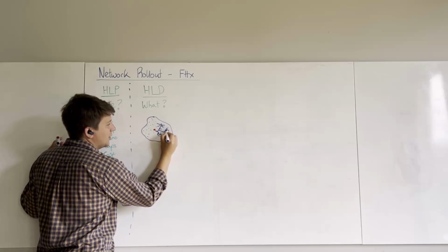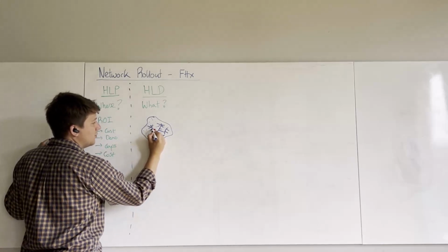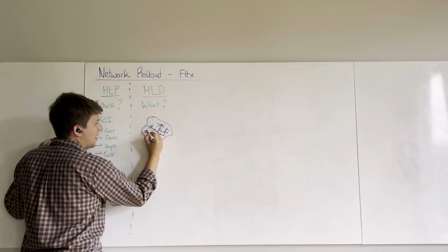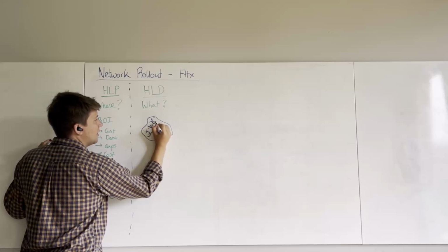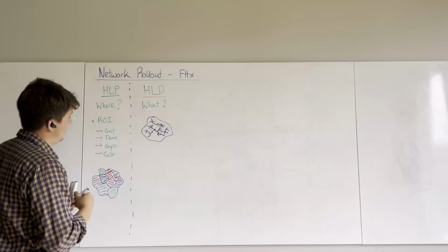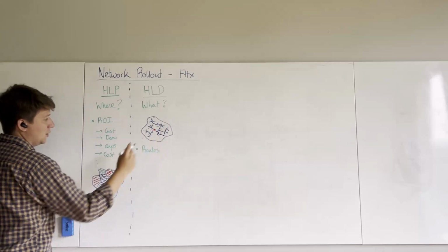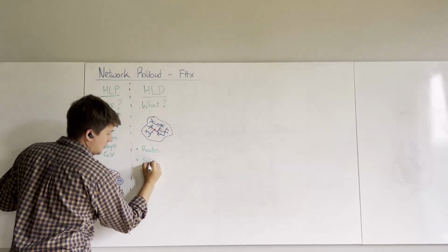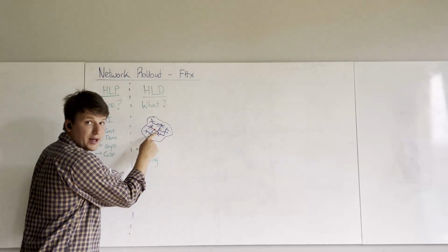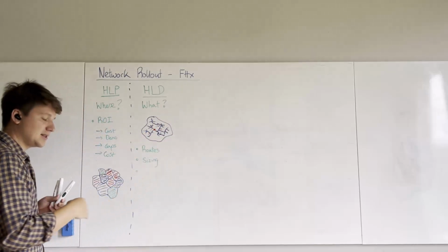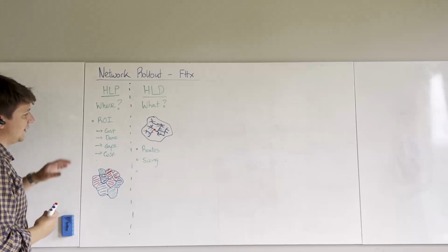This is the main thing that we're trying to figure out. So you'll get lots of cables here. What's really important from a high-level planning perspective is to understand a few things. We want to understand routes that we're going to go down, so these blue lines, and sizing. What size cables do I need? Does this cable coming down this road here need to be a 48 or a 96? Because there are different costs associated to that. Yeah, these are the things that we're trying to look at.